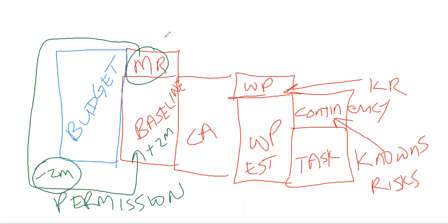And whenever you look at a graph where there has been replanning or there has been an approval for additional monies, it is very obvious. You see a change in those graphs. You can tell what has happened at those points. And that is the summary of the difference between management reserves for unknowns, okay, versus contingency reserves, which are for known risks. And let me just correct this.